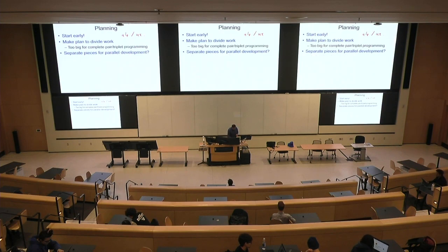So I guess one thing, we can go a little further. We can break up the input UI, which is actually independent of the output UI. So we need to be able to, with both mouse input and text input, find two intersections. Well, you can write all that code and just basically return those two intersections, highlight them, print them out, whatever. You can confirm it works. You can make sure it works no matter what the person types, etc. So that can be done as one task.